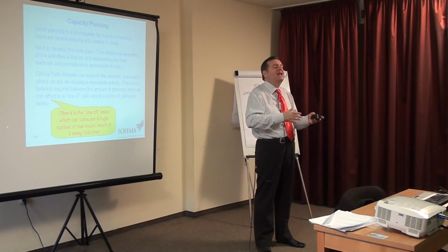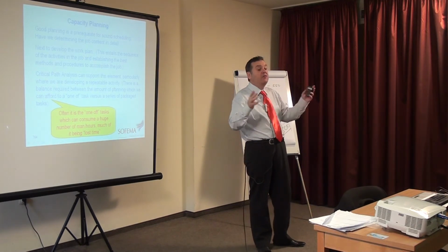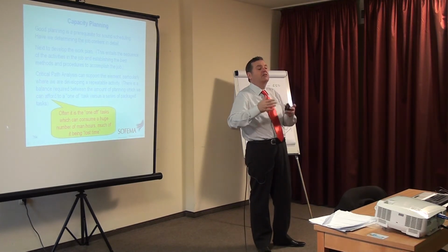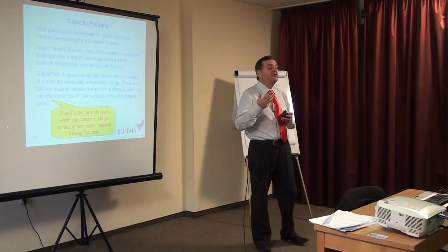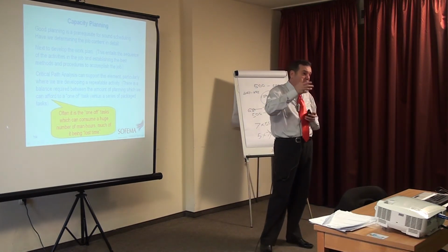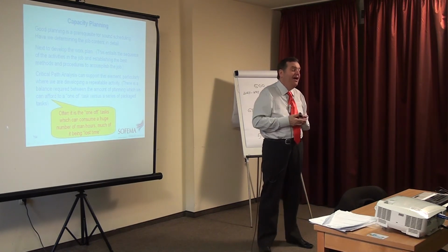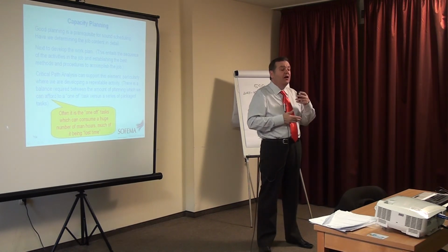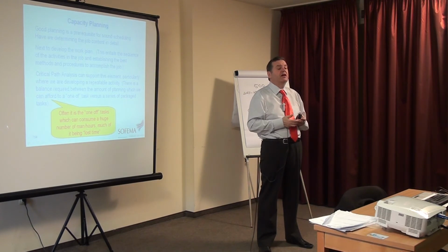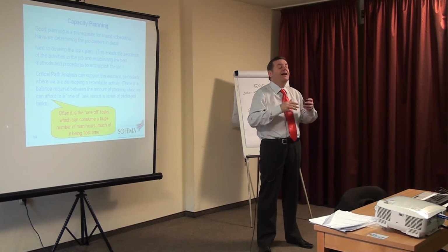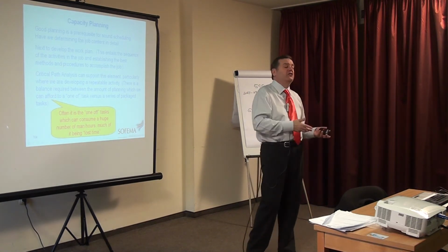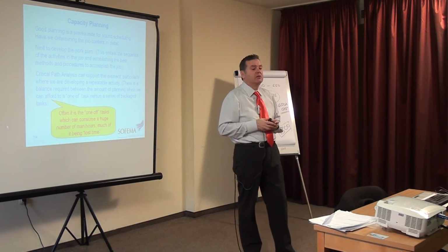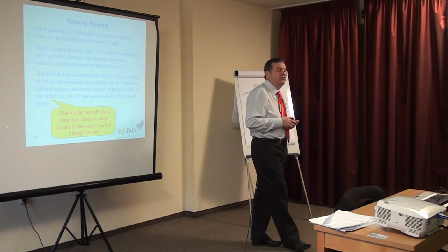If we don't manage the critical path, then the reverse happens. We add, and for example, spares. We need spares at a certain time. If you do not give me the spares today, I cannot finish the work in the fuel tank, I cannot close the fuel tank, I cannot fill the fuel tank with fuel, therefore we cannot finish the check, we cannot do the engine run. How long is it going to take you?